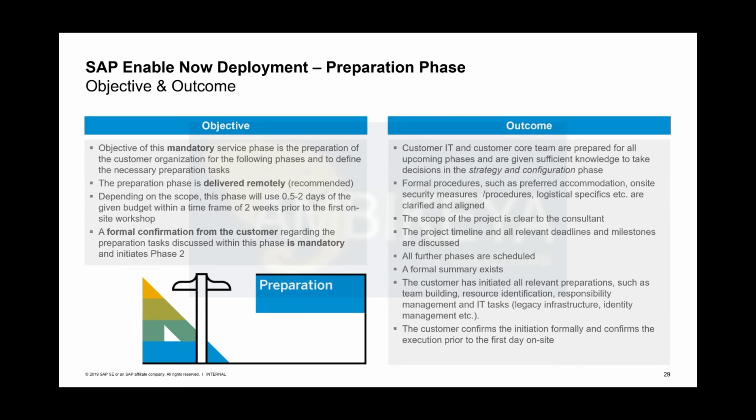So that was the finding so far. Unprepared customer, no one knew what to do. The consultant was sitting on the bench for the first 2 days. We already had an escalation before we even started. This is exactly what this phase should compensate.